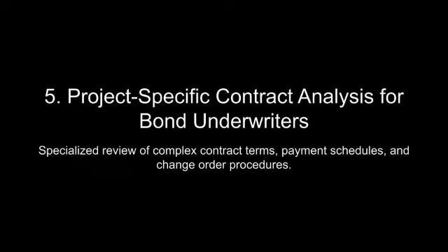To balance these risks, underwriters must conduct a thorough review of the contractor's financial health and project management capabilities. This includes evaluating the contractor's track record of meeting deadlines, their cash flow reserves, and their capacity to absorb potential liquidated damages without jeopardizing project completion. Additionally, sureties should advocate for clauses that provide opportunities for mitigation, such as grace periods or negotiated reductions in damages for partial compliance. These mechanisms can help ensure that contractors remain incentivized to complete the project without facing insurmountable financial penalties.